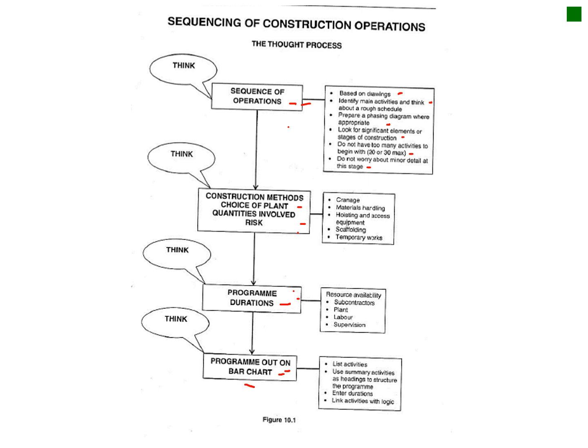Okay, then you look at your method statements. Where are your cranes going to be? Material, hoarding, hoisting, access, equipment, scaffolding that you need to acquire. Temporary works. Will you have to build a temporary shelter maybe for a certain section that you have to have precision painting put on, for instance? Do you have to construct formwork temporarily for a short while as you pour your concrete, that type of thing?